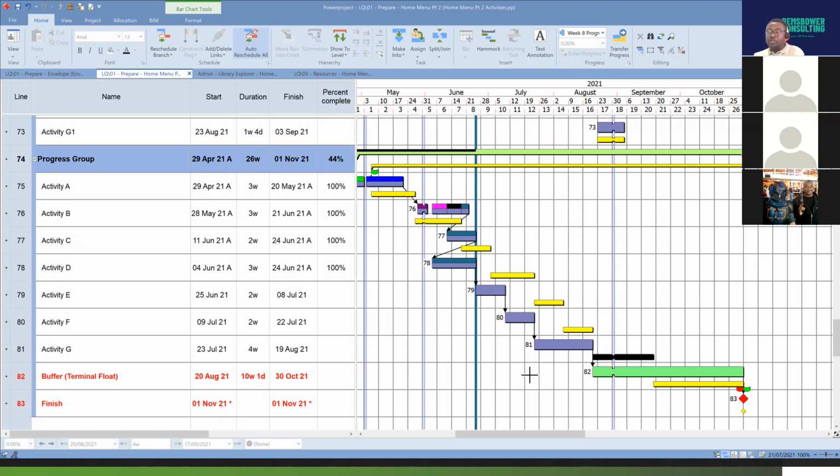You get the point? So certain work may be delayed eventually. And that's why sometimes when people talk about accelerating, you don't just accelerate for the sake of accelerating. You need to consider several other factors. The fact that you accelerate does not mean you can actually accelerate, because something else may just pull you down. It could be a small issue such as a brick angle, which cannot be supplied because you have given them an earlier date, which is later than what you're now asking them to meet. Does that make sense? Yeah, I understand it now.